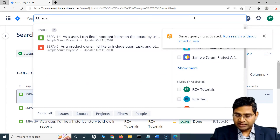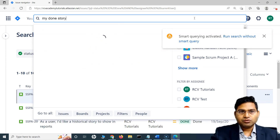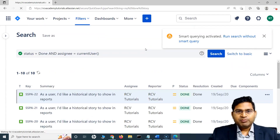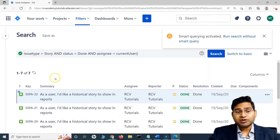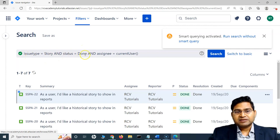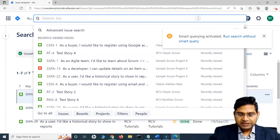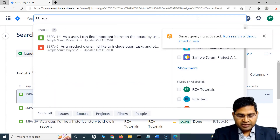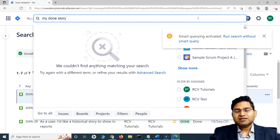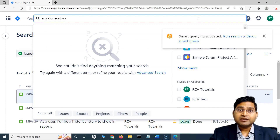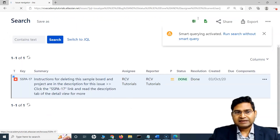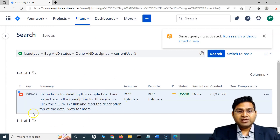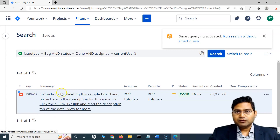If I add 'story' to the query — 'my done story' — let's see whether 'story' gets mapped as well. Yes, it did — the issue type got mapped to 'story'. So with just three keywords in the quick search, I'm able to get all the stories completed by myself. Similarly, if I say 'my done bug', it gives me the bugs that have been closed by myself, and you can see the bug results are being displayed.